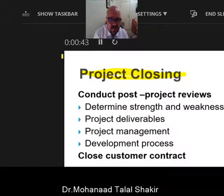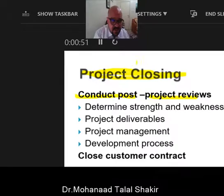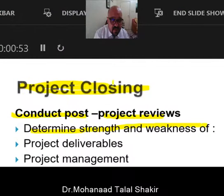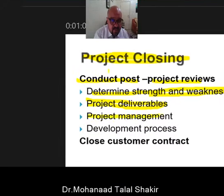In this phase, we must follow many points. Firstly, conduct post-project review. Under this title, we must determine the strengths and weaknesses according to project deliverables, project management, and the development process.